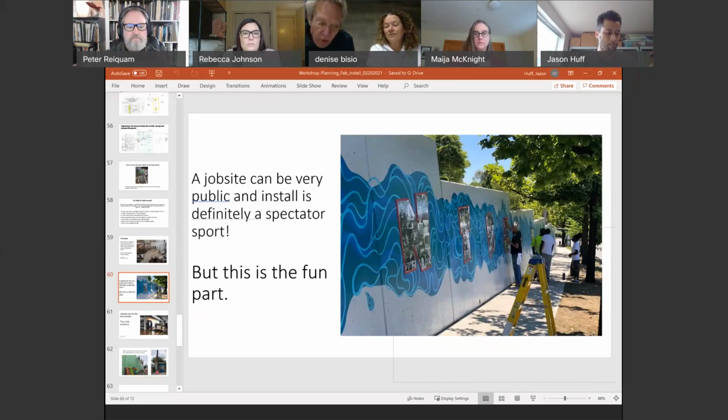When you walk your path, whether it's making your art, fabricating your art or installing your art, always write down your assumptions and always write down your questions, in a little book, on a piece of paper, whatever it takes. Think about those as you progress, and how that helps you develop your ROM, or how your ROM helps you develop your assumptions. Those two work together really well when you get them on a piece of paper.